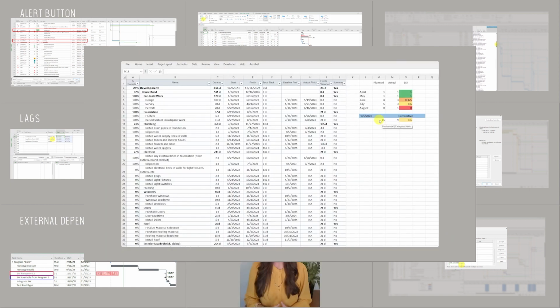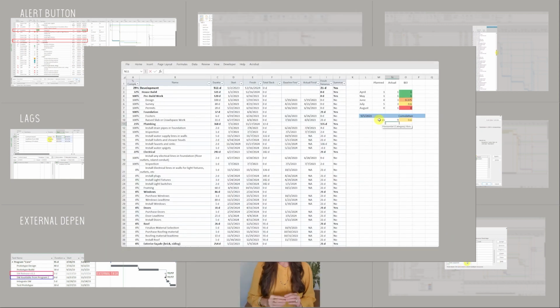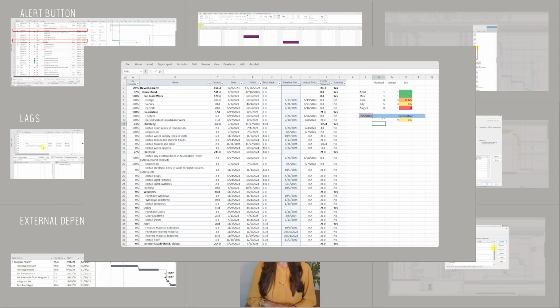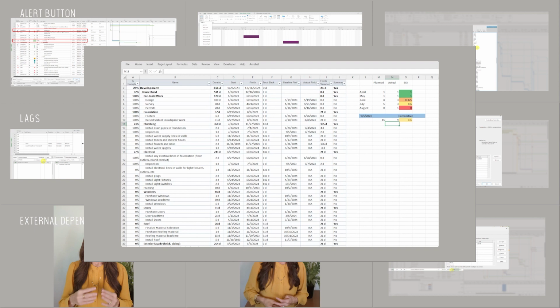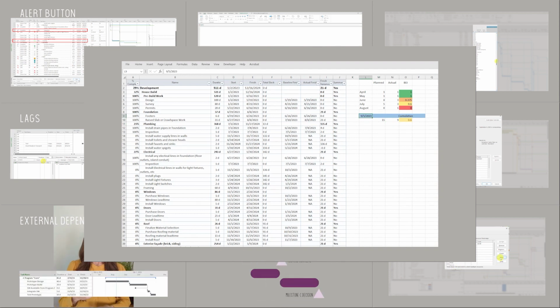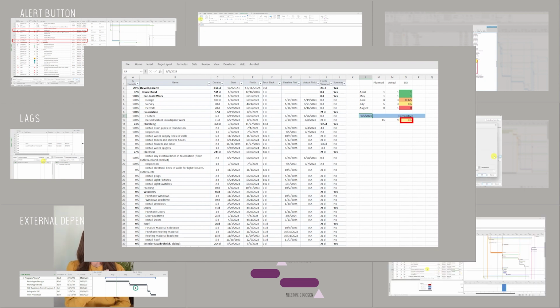Then I have formulas to say, for my plan task, I am going to count if and look at the baseline finish and count how many dates were prior to that status date of 9/5. It calculated 15. So you can see here where we had 15 things planned prior to 9/5, and we only got 9 things done. So that cumulative score is a 0.6.